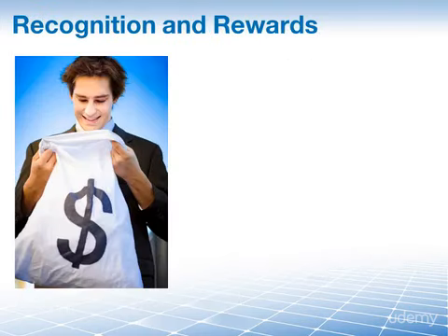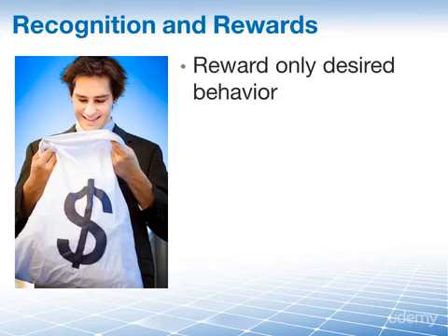When we talk about recognition and reward as a tool and technique, we have to specify that we only want to reward people who exhibit desired behavior. For instance, working overtime is a good thing if it helps the project to finish on time and should be recognized and rewarded. However, not doing your job for 5 weeks and then working overtime in the last 2 weeks in order to make up the time lost and meet the deadline, well, that's not desired behavior.